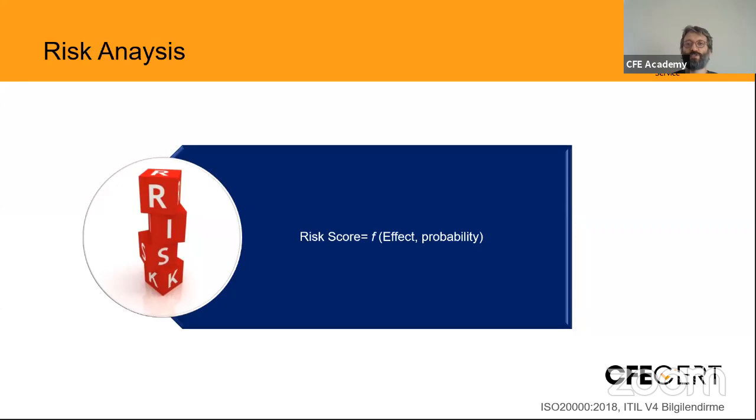And in the process for Article 6 of the standard, you have to write down a level of this scale which defines the probable risk level. For example, using the numbers and the formula, you get a risk scale with a minimum of 1 and a maximum of 100. You say that every risk above 60 is not tolerable for us, and we are going to implement an ITIL-based ISO 20K process in order to reduce this risk.